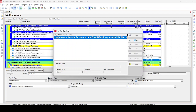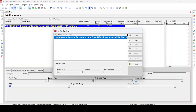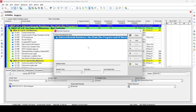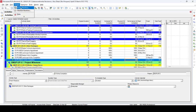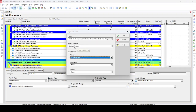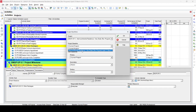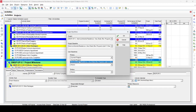After pressing OK, we wait a moment for it to complete. Once it appears, the project is now added as a baseline, but we have not yet assigned it. We close this dialog and go to Project > Assign Baseline. In the Assign Baseline dialog, we select the recently converted 13 March program. We make sure to assign it as both the Project Baseline and the Primary Baseline, since dates are sometimes taken from each. It is recommended to assign both. Once assigned, we click OK.